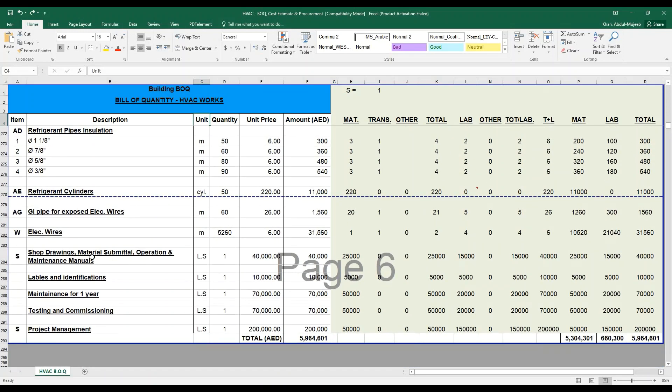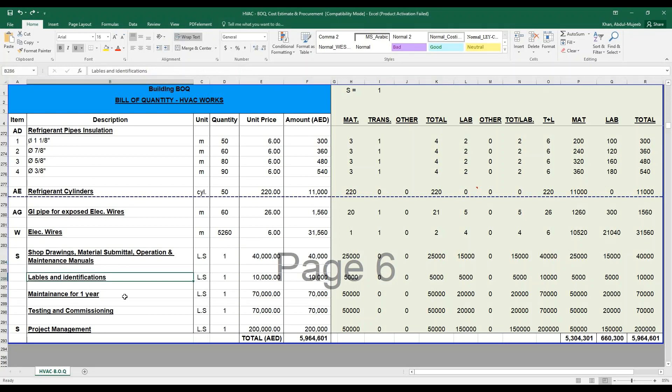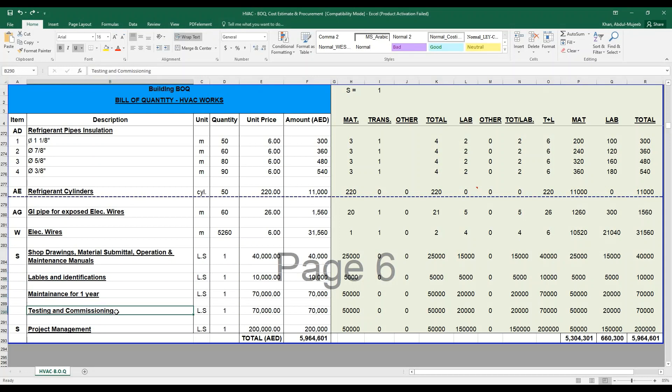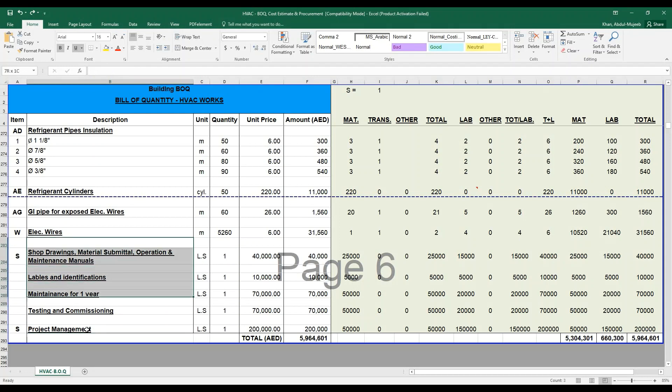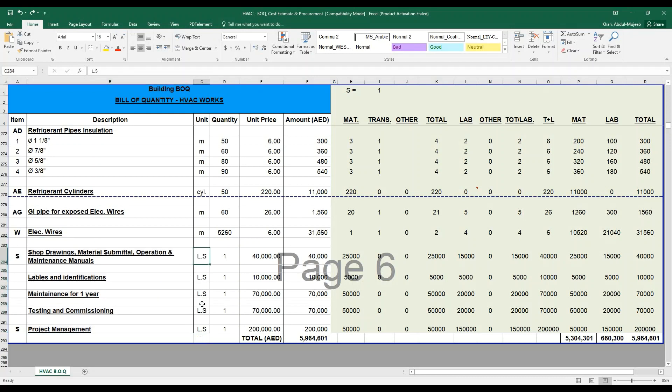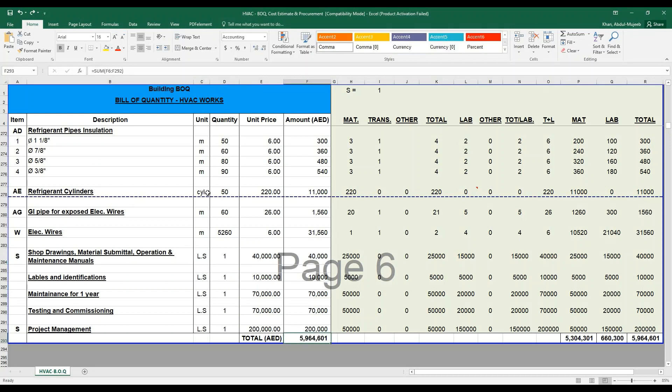And last, you have to also consider the shop drawing, material submittal, operation and maintenance manual, labels and identification, maintenance for one year, testing and commissioning, project management. These are miscellaneous items which have to be considered based on your project requirement. These values cannot be measured in an actual unit, therefore it is called an LS or lump sum item. By calculating all these particular items, you will derive a total bill of quantity for an HVAC work.